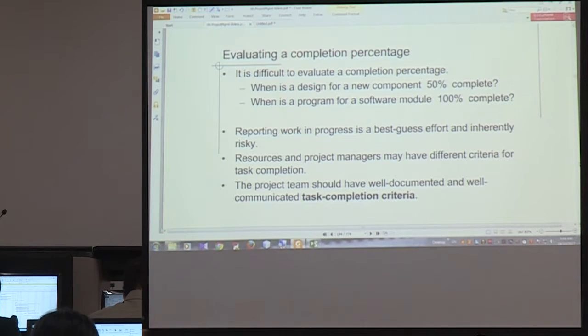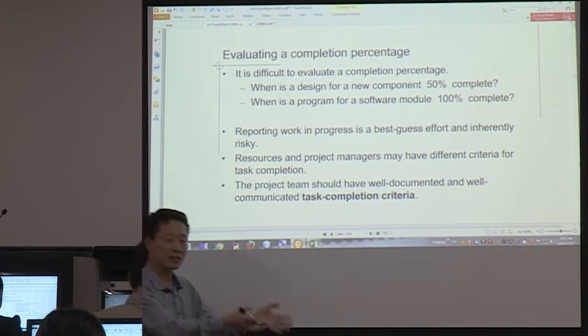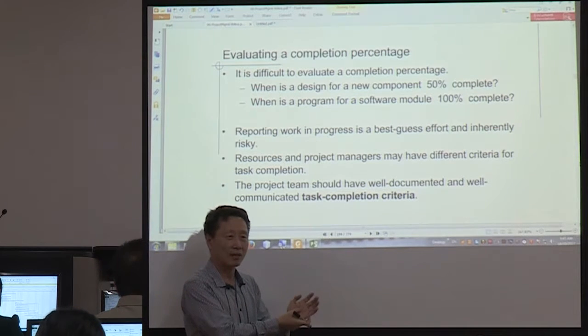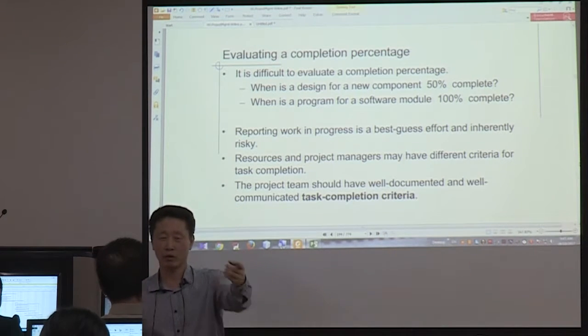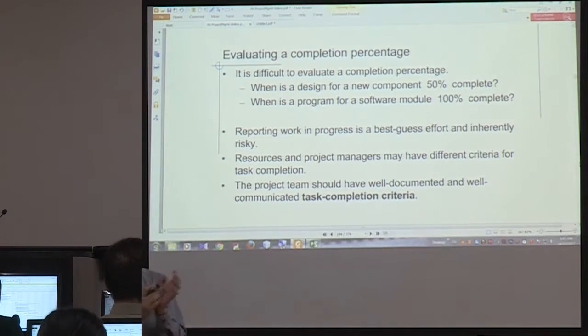Is it design complete? When I design it is complete, is it 100%? No, obviously not. When I test complete, is that 100%? Maybe yes, maybe not. So you need to talk to your members. What is 100% complete? Otherwise, everybody has a different idea about 100%.